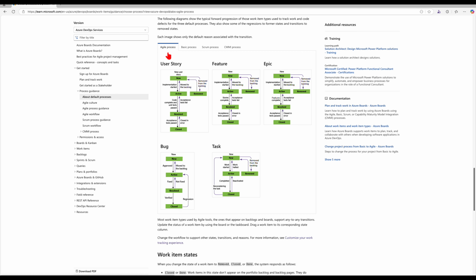course. So the Agile process workflow in Azure DevOps follows a straightforward, predefined lifecycle. The state of new represents that the work item is logged as a new item, so it may need to be reviewed, estimated, and/or prioritized. The next state is active. This is where the work begins. Development and unit testing, for example, are in progress.